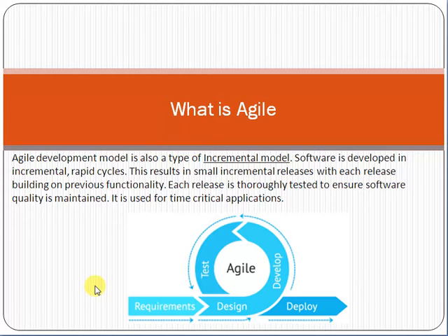So sprint 1 will contain 10 tasks. We plan, develop, test, and deploy. Then sprint 2, sprint 3, sprint 4. In that way, when we reach sprint 4, we complete all the tasks of the e-commerce solution, all the 40 tasks. So first of all, agile is more flexible and more adaptable, and we get customer feedback at a very early stage, and it is nowadays very popular.